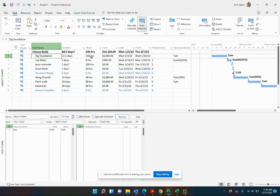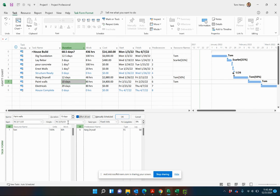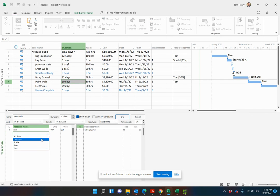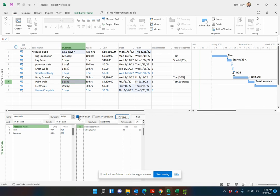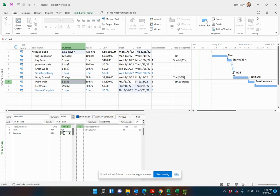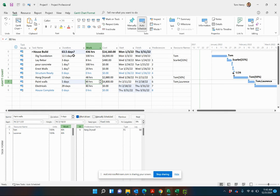We go back to the Gantt chart view. You will see that the work can be split appropriately. So if I have 100 hours, let's take another example here. 10 days, 80 hours. If I make this an effort driven task and assign a second resource, the work will be split across both resources. Effort driven essentially locks the work for that task. Says you know this task is 80 hours. I don't care how many people you throw at it. It's going to be 80 hours of actual work. The duration can vary, but it's an effort driven task. So because I had that first calculation of effort, I locked it. As I add and take away resources, it's going to really help me to keep that number of hours consistent.